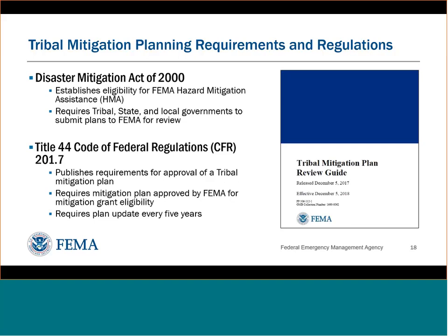And this will actually help you walk through it, and as you're developing a scope of work for a planning grant application, you can really walk through this to understand what you'll be required to do to make sure your plan is approvable by FEMA. A couple other important things here is that the plans are on 5-year life cycles, and so you have to make sure that you update your plan every 5 years to maintain eligibility.